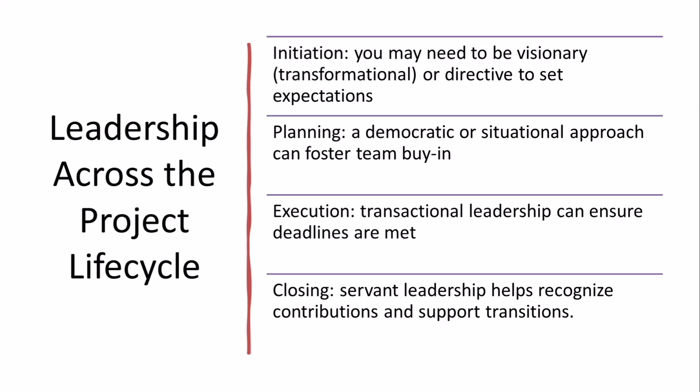Leadership needs shift across the project lifecycle. In the initiation phase, you may need to be visionary, transformational, or directive to set expectations. During planning, a democratic or situational approach can foster team buy-in. In execution, transactional leadership can ensure deadlines are met. And when closing a project, servant leadership helps recognize contributions and support transitions.